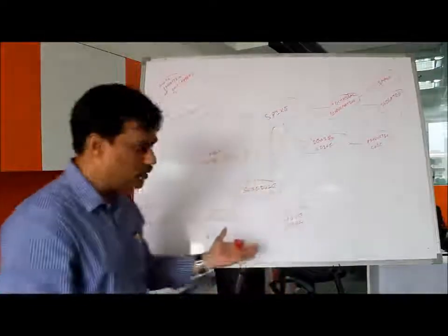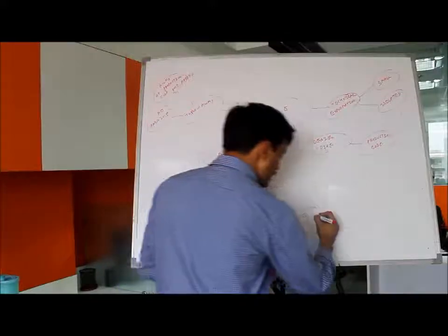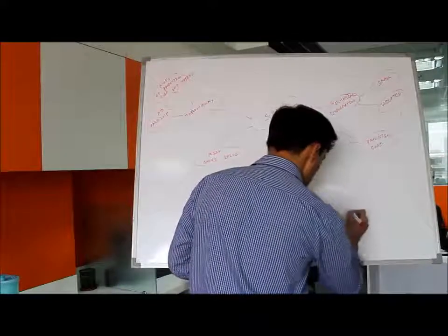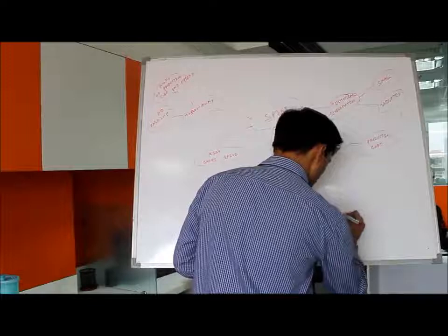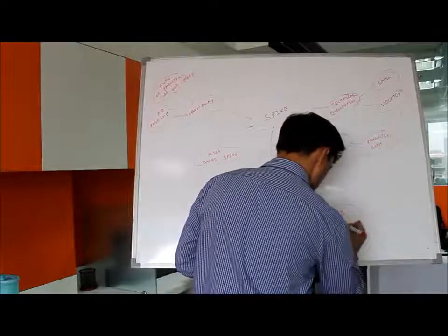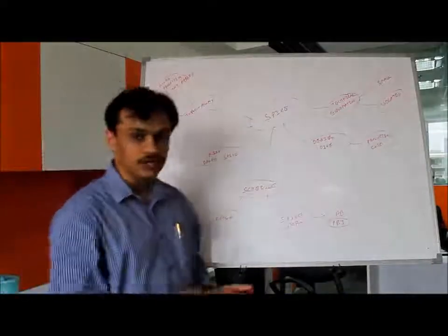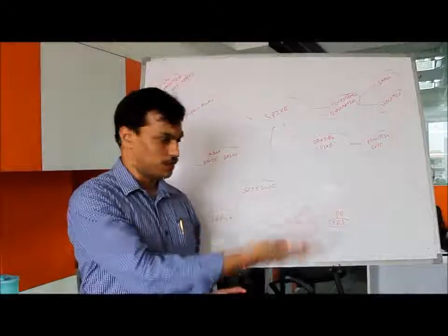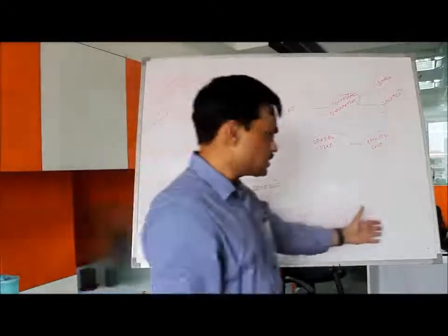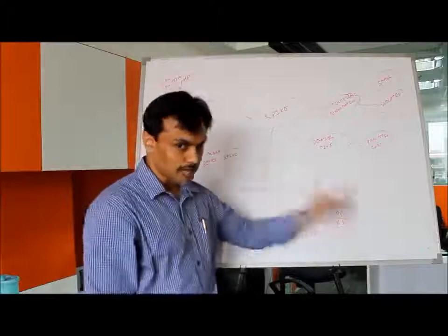And the spike story is scheduled and managed via the product backlog. So the spike story becomes a part of the product backlog, and it is a product backlog item. So it's a product backlog item in a product backlog which is catering to an investigation of an alternative, which gets scheduled in consultation with the product owner and team whenever the priority is right.